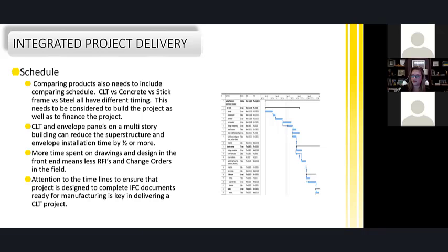The timing works well. You can do a floor by floor, and it gives you a nice momentum on the project. So again, all those things were happening, all the pricing is happening. We're constantly making considerations. What does that look like? And how does that timing work? Time is money, right? For us, it's between $250,000 and $280,000 a month with a crane on site. And we want to consider that price tag. Having that is very expensive. And if we can reduce that time, that alone is a large chunk of money. Then on top of that, you have carrying costs for financing.